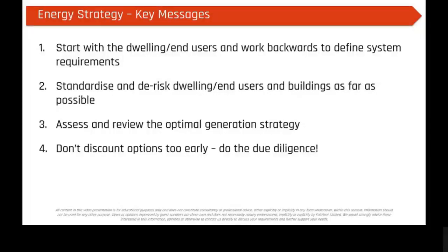And the last one is, I've seen a lot of options dismissed early, you know, it could be ground source is too expensive, when actually you get 12 months into the design program and it's realised that the rooftop value of that building was far more significant than it would have cost to put the ground source in, because maybe there was commercial space up there, leisure facilities, amenity space. So make sure you're optioneering at the start and giving that due attention, not taking stuff off the table quickly that you might come down the road later on and realise, oh, that might have actually been quite a clever solution. So really do the due diligence up front.